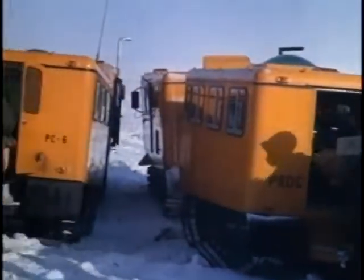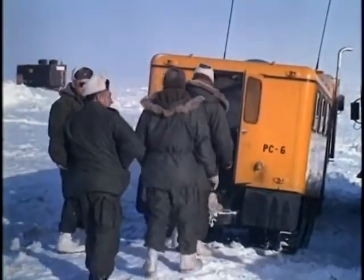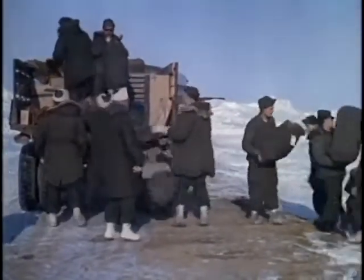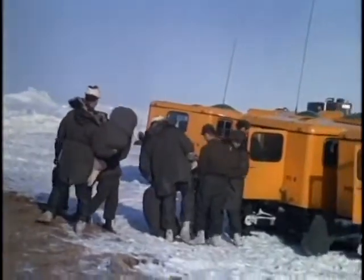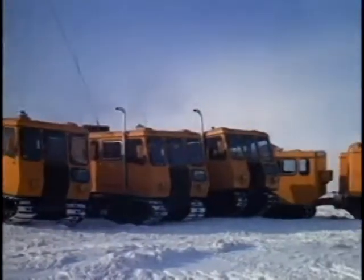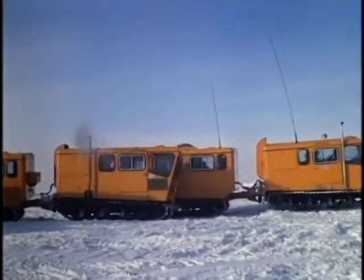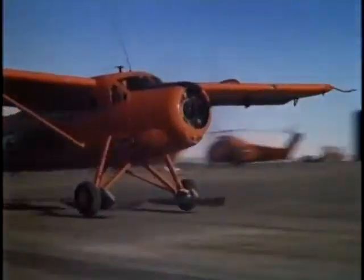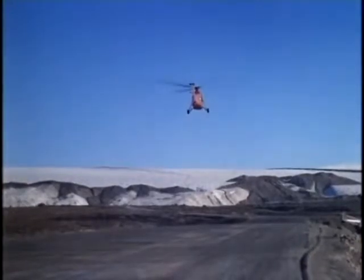At the same time, we used another type of smaller vehicle to transport an advance party. These pole cats would average 10 miles an hour and make the trip in little more than half a day. A convoy of pole cats, each section carrying six men, was called a light swing. We also used light aircraft. Throughout the operation, these flights brought in key personnel, special cargoes, and mail. We couldn't forget anything. This wasn't country in which to turn around and go back.